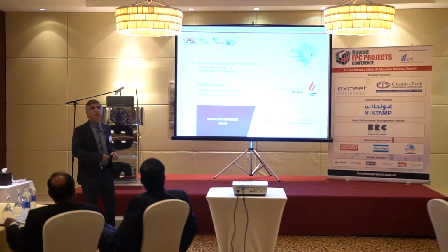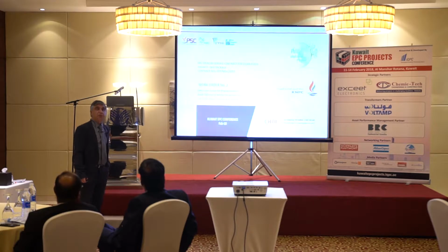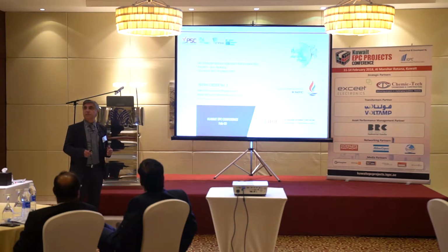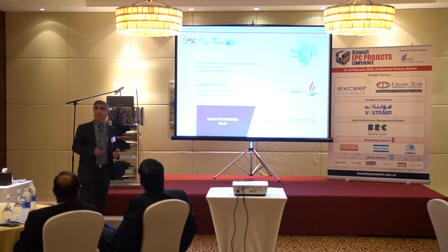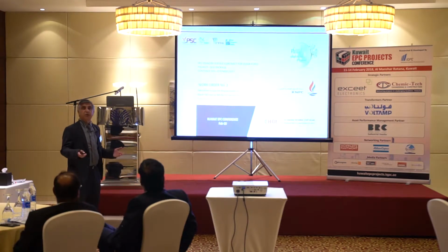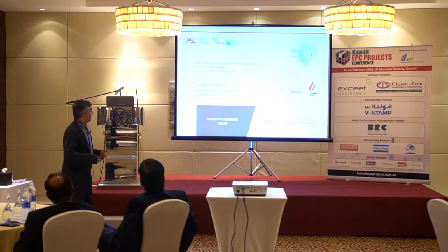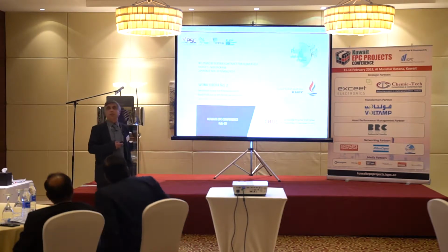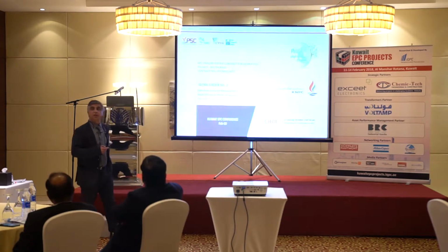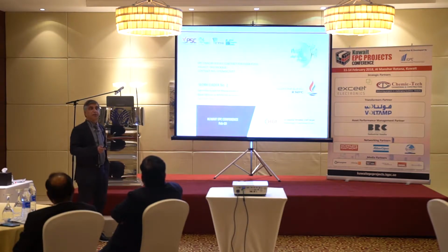Last year we have been awarded an EPC contract with KMPC. The nature of this contract is called the standby contract. That means you receive work orders from KMPC depending on the needs of the client. We evaluate this work order, estimate it, and send it back to the client. The client evaluates the work order again and sends it back to us. If the work order is accepted, then we start the work. Our first work order was the most challenging work order, not only for us as a local contractor, but also for the client, KMPC.